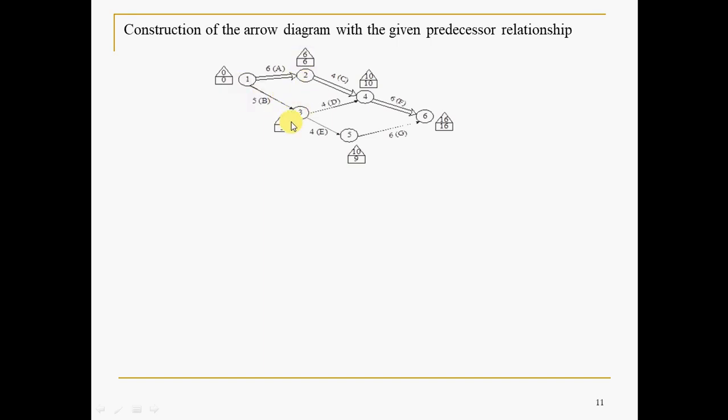Fine. If you go like this, 6 minus 5, I mean this triangle value minus this activity time, it will be 1. Whereas if you go like this, 6 minus 6, 0. If you are going back, it is considered as delay, and that should be minimized, hence you will take the minimum in the backward pass.